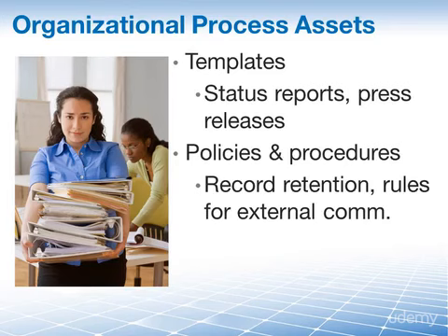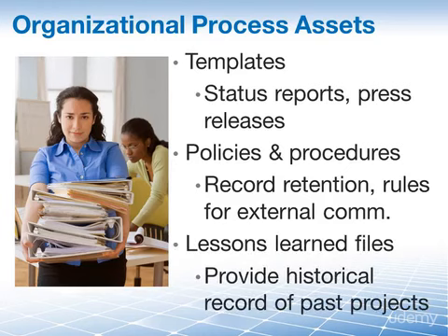Then there might be policies and procedures that discuss record retention and tell us that we must keep all formal project communications for 10 years, or that all external communication must be managed by our marketing department and not by our internal project staff. And then there may also be lessons learned files or other historical information from previous projects that you can now use to better plan communications on your new project.